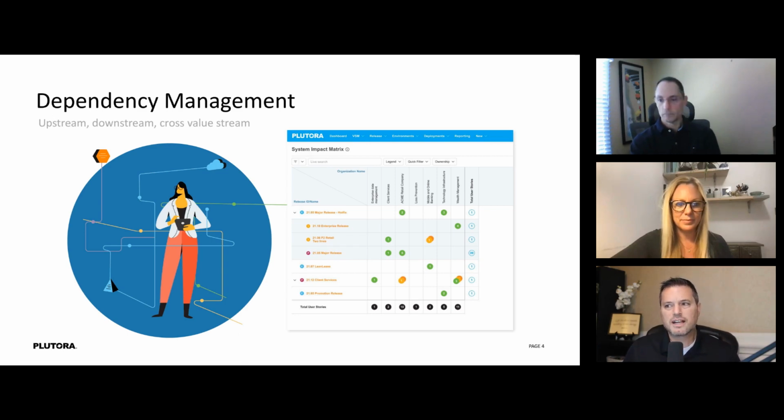Now, there's some other kinds of dependencies that we can track in there, but ultimately if you're managing risk, you're looking at the overall, how many impacts are there, how many changes and how many releases are there changing for a particular application, because that's usually a hotspot for looking for risk. And if you're managing by exception, that number of user stories that are changing a particular component is interesting, because where I've got a high number, generally that's where I should look for problems. And maybe look for resolutions as well, how to break those famous dependencies.